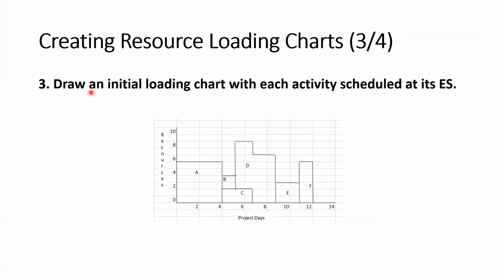In drawing the loading chart, you have to take the resources on the y-axis and project days on the x-axis, and draw this initial loading chart with each activity scheduled at its early start time. You have to start all of the activities at the early start time, right?